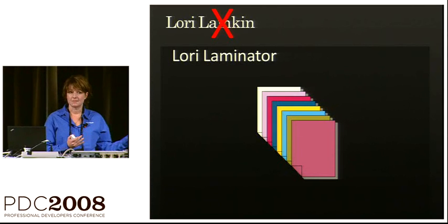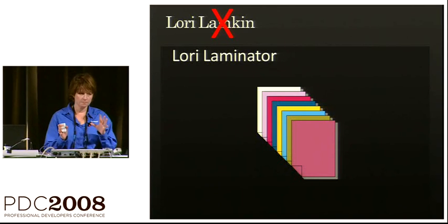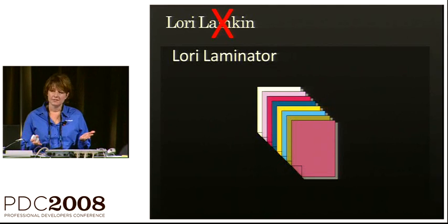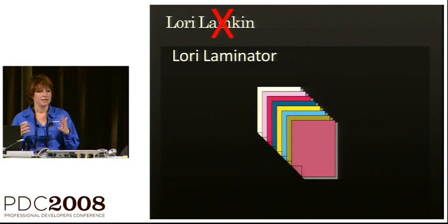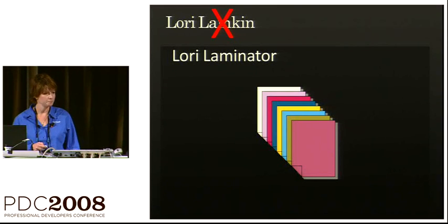I learned from that experience that you could time box the schedule. That can be pretty stable. But the feature list needs to change because the customer needs are changing or the design is changing, and freezing it is really just counterproductive.